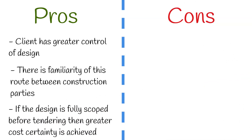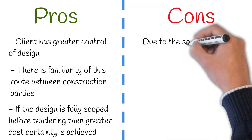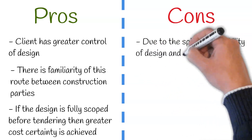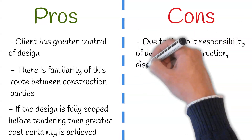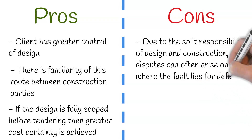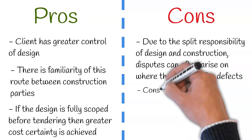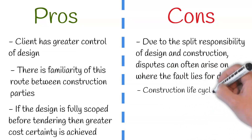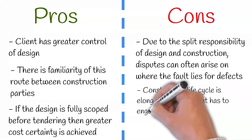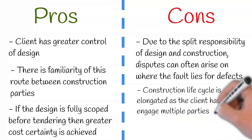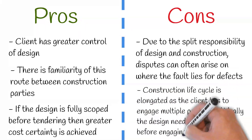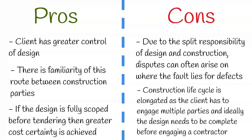Cons to this route include: due to the split responsibility of design and construction, disputes can often arise as to where the fault lies for defects. The construction life cycle is elongated, as the client has to engage multiple parties, and ideally the design needs to be complete before engaging the contractor.